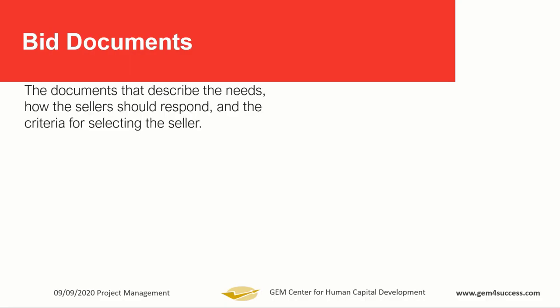So, bid documents are documents that describe the need. Remember, a bid document originates from the project manager, from the procurement manager, from the project itself, requesting either information, a proposal, or a quotation from the general public, from capable vendors who are interested. So, it describes the need.